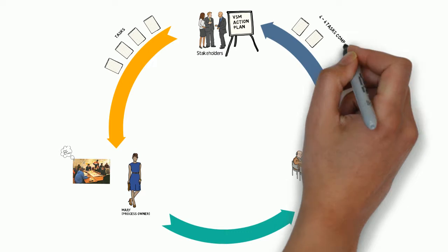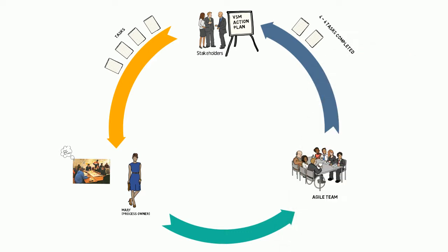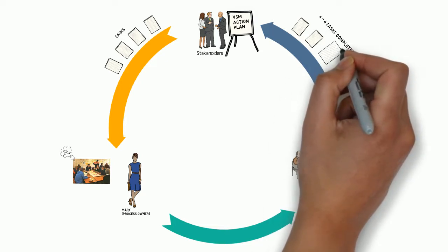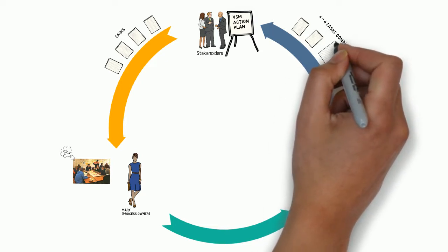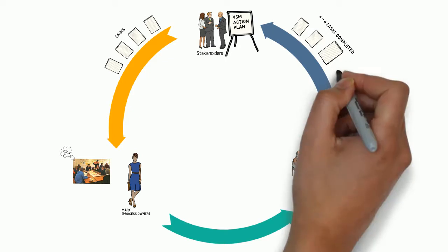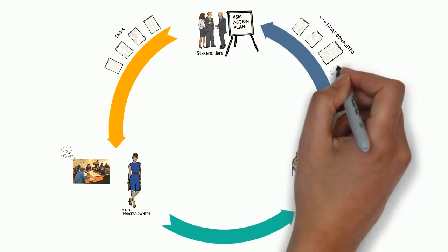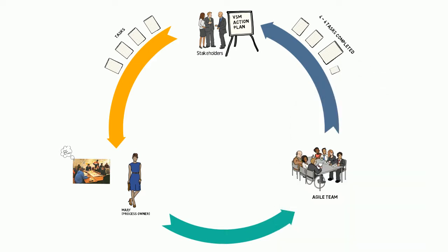Capacity is easy to measure. Just count the number of tasks delivered a week. Some tasks are big and count as 2. Some are small and count as a half. But all in all, it counts up to 4 to 6 tasks per week. The time frame for delivery, in this case a week, is called the sprint. A sprint to deliver the 4 to 6 tasks.